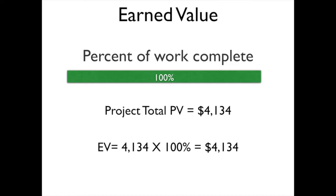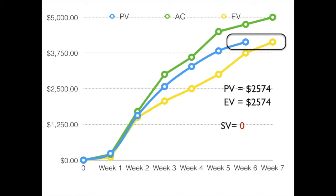So, even if this project gets done six months late, or a year late, whenever it is completed, the earned value is going to essentially equal the planned value — because we're going to take the planned value, multiply that by 100%, and come up with, in this case, $4,134. So, we could very well have a situation where our project gets done not in week six but in week seven, and we will have a scheduling variance at that time of zero.